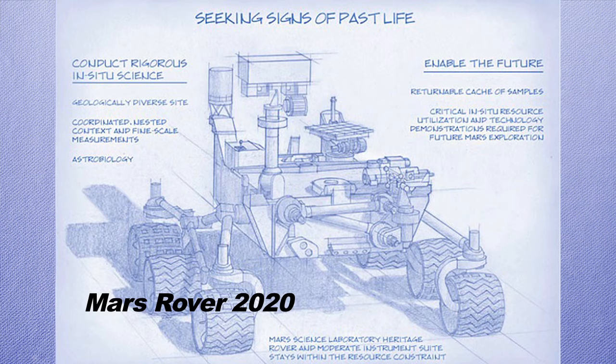Instead of the previous phase where many different concepts could meet the objectives, Phase A uses one baseline concept to flush out a little more detail. There may sometimes be more than one concept, but you are trying to move towards a single design as opposed to many different concepts that can meet requirements.